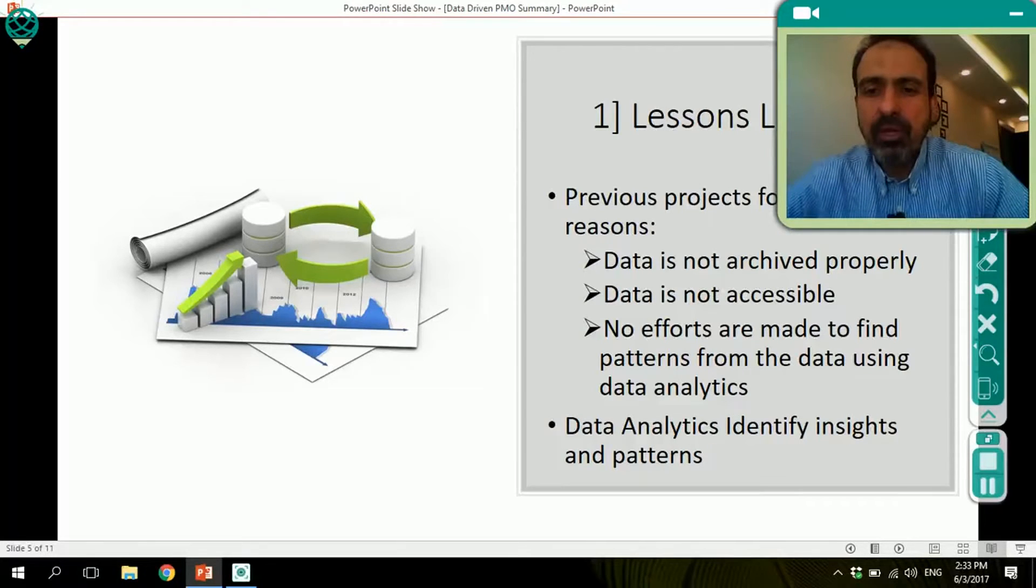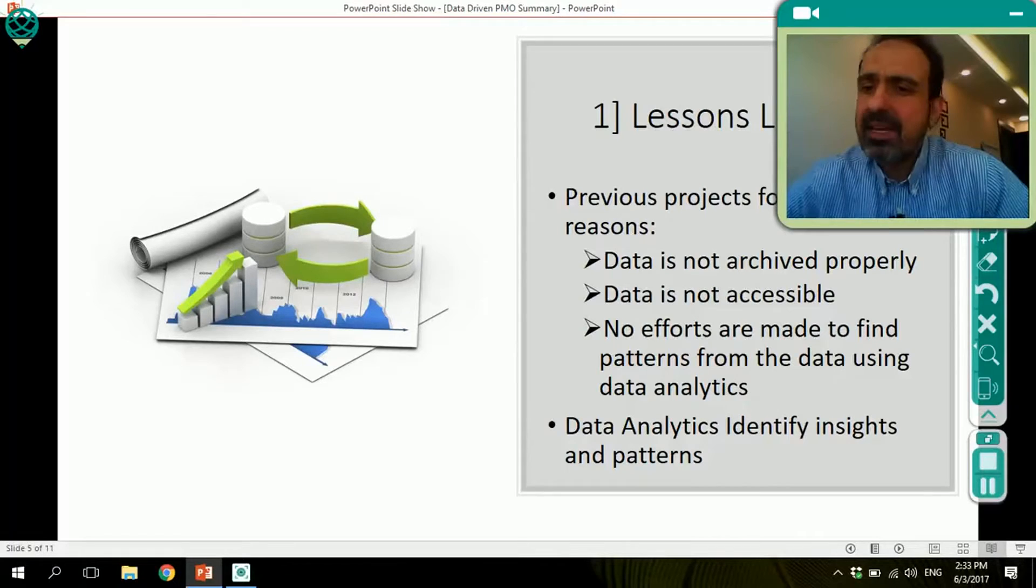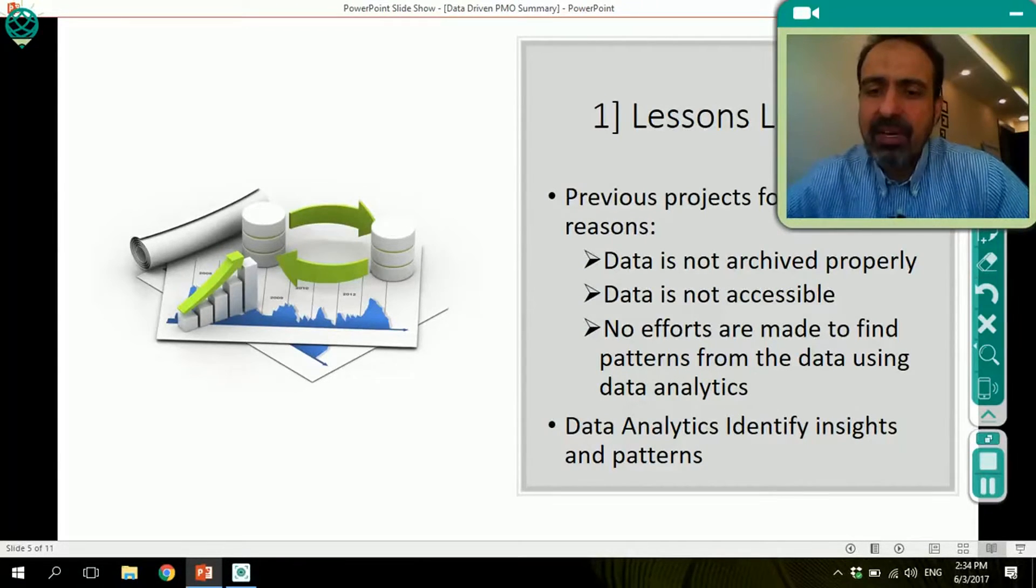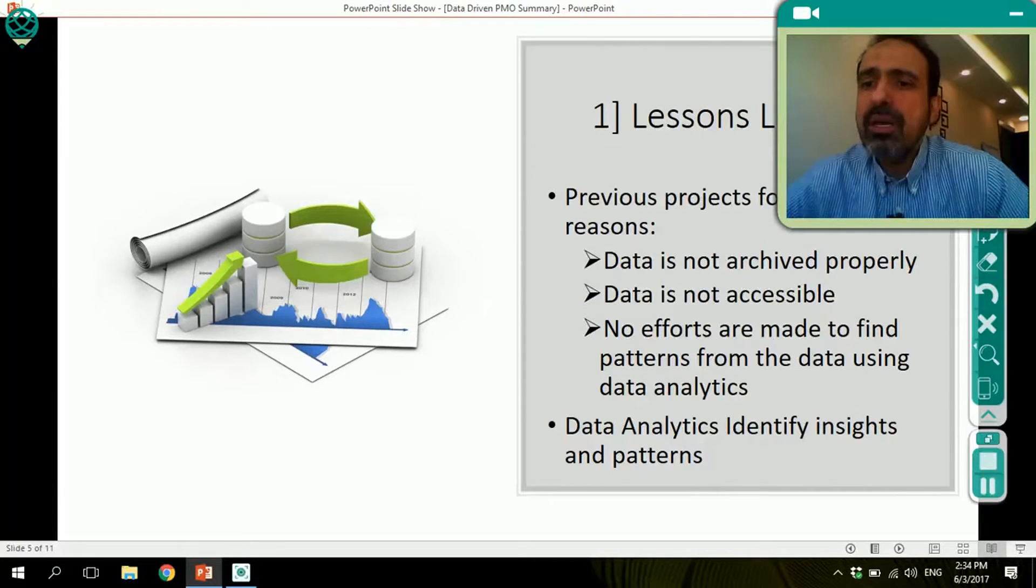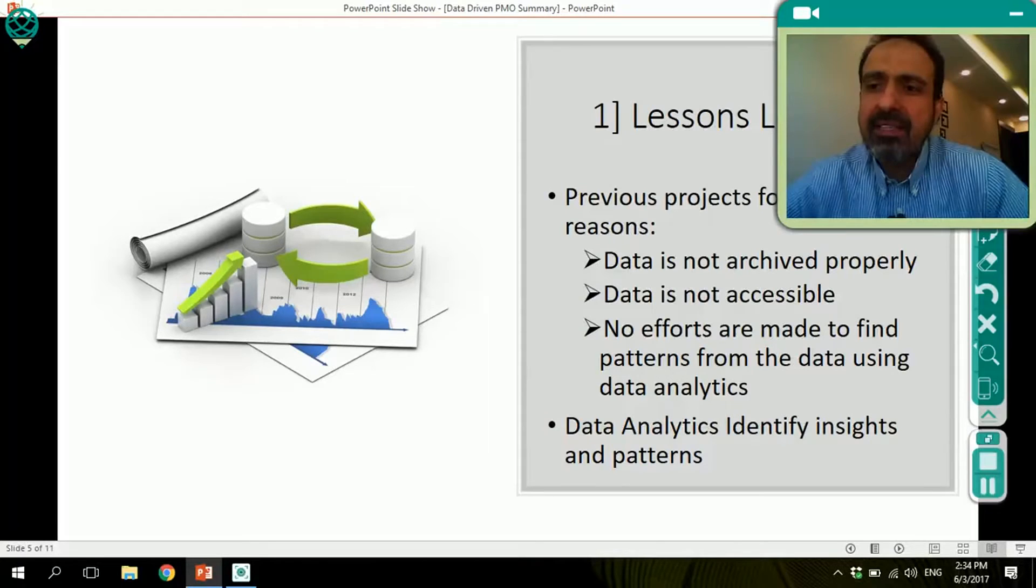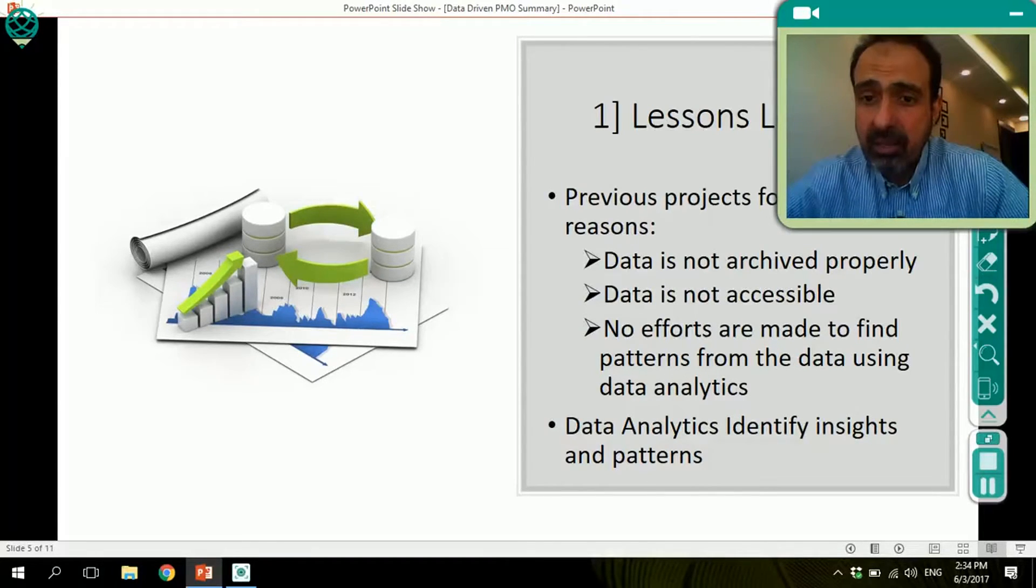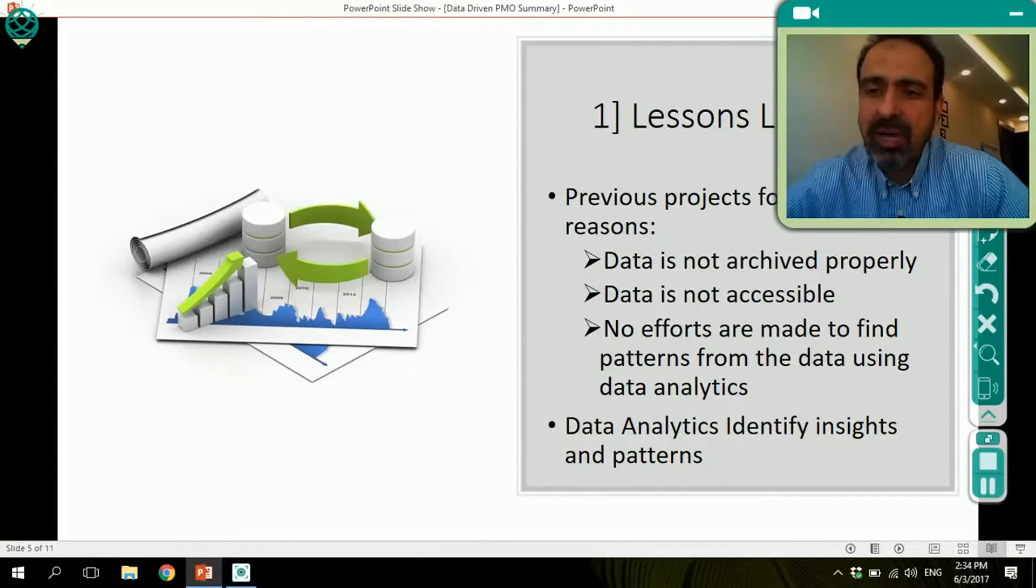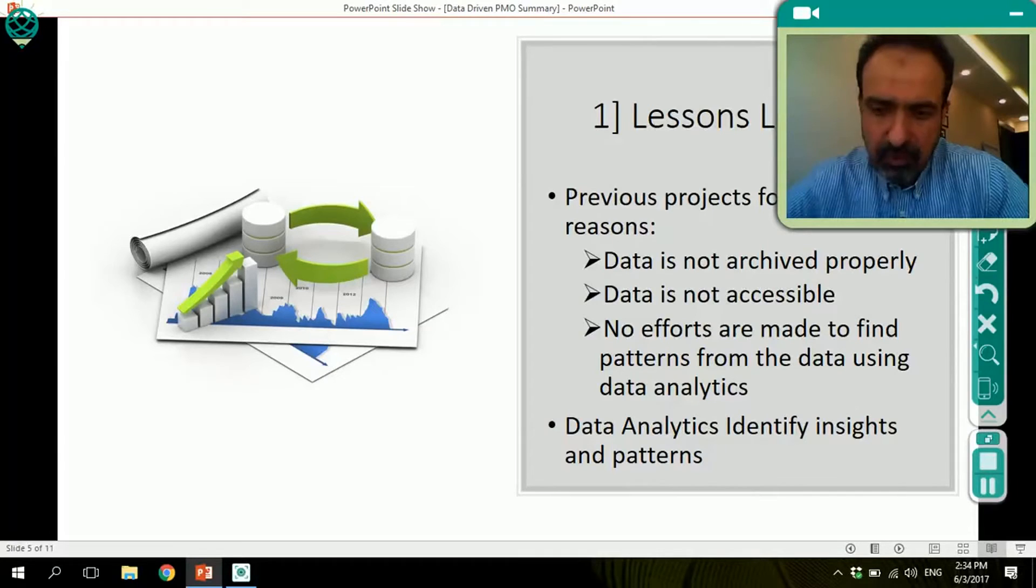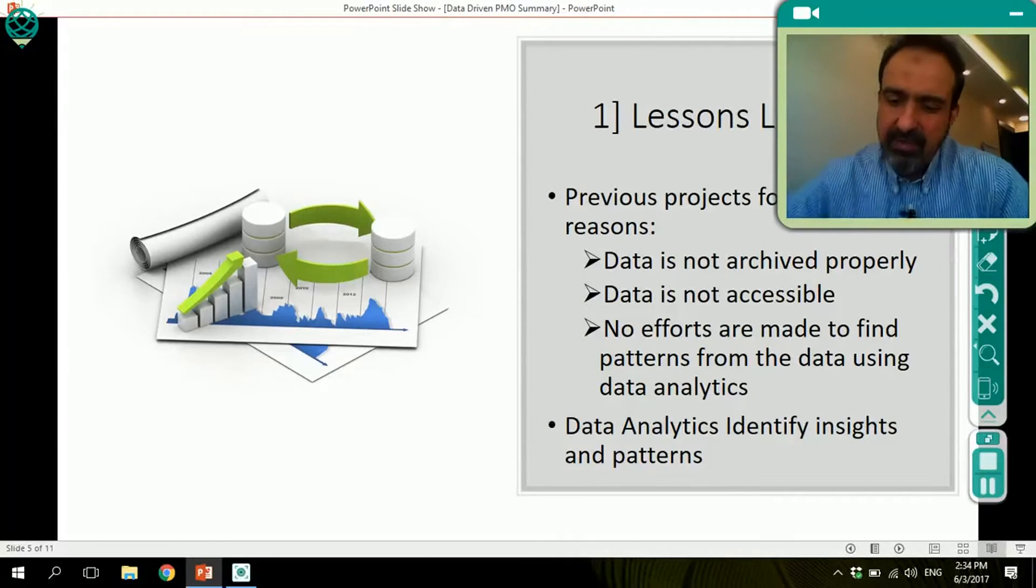But unfortunately, using lessons learned is facing many problems. One of them is that data is not archived properly. The other is that data itself is not accessible. And finally, there are no efforts really made to find patterns from the data using data analytics because processing time used to be very expensive. Analytics software was very difficult to use. But today it is doable. We can actually use data analytics tools, simple data analytics tools, to help us look through data and find relevant lessons learned for our project. We can identify insights and we can identify patterns.